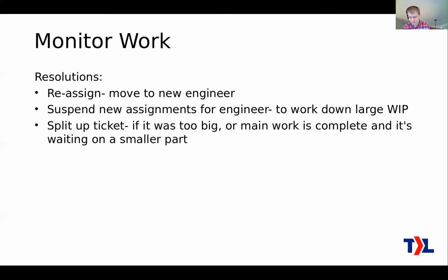You can split up a ticket sometimes. If you initially made a ticket too big, and you're like, this ticket's going to sit here for a long time, and I'm not going to be able to see the details of what's happening in it so I can report it back to the customer or manage other things, because the ticket was initially too big, then anywhere in the cycle, go ahead and split up that ticket.